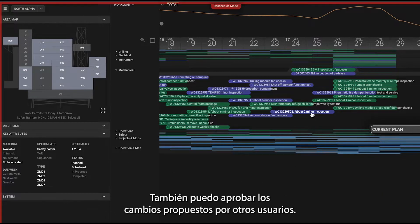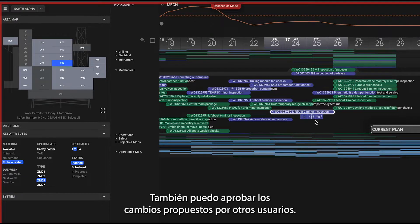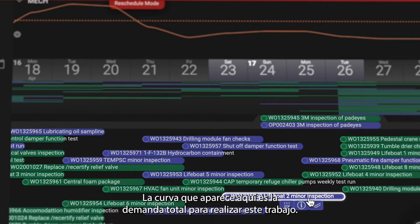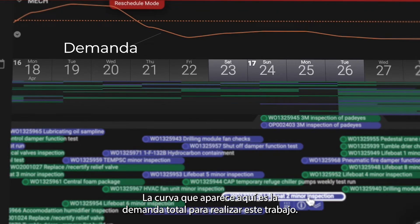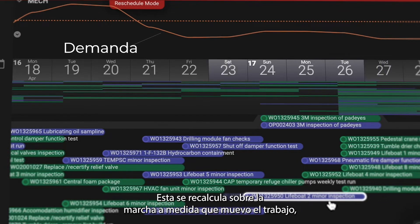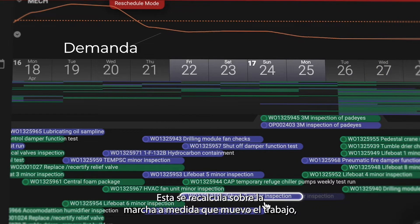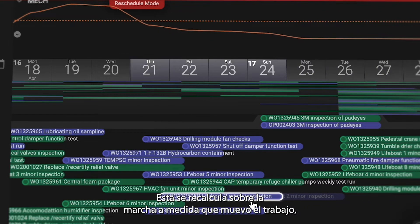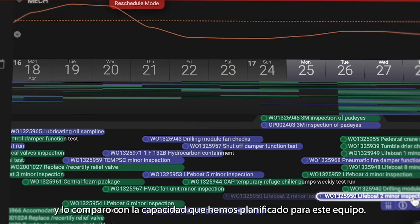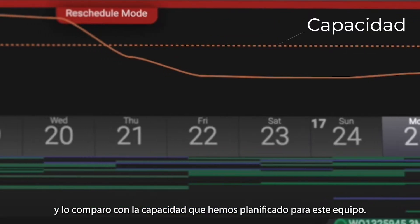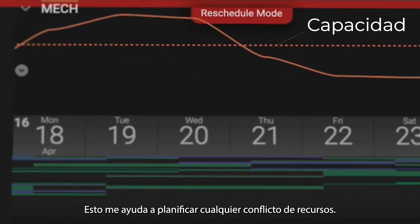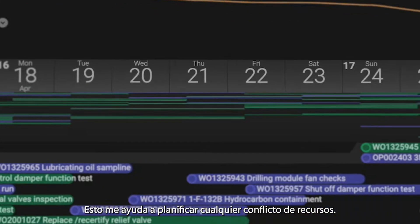I can also approve changes that are proposed by others. The curve that pops up here is the total demand for the craft of this job. It recalculates on the fly as I move the job around and I see it against the capacity we have planned for this craft — and that helps me plan around any resource conflicts.